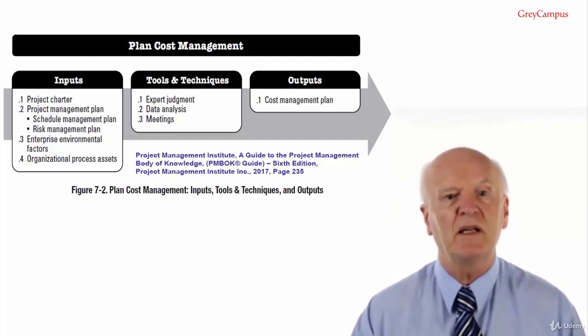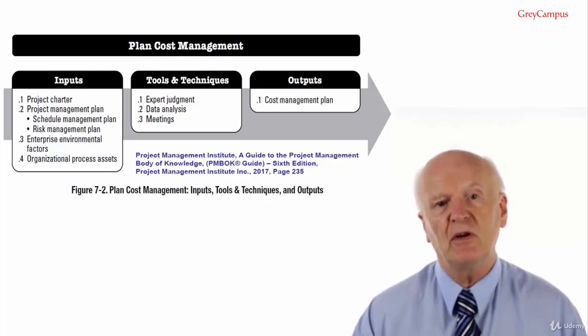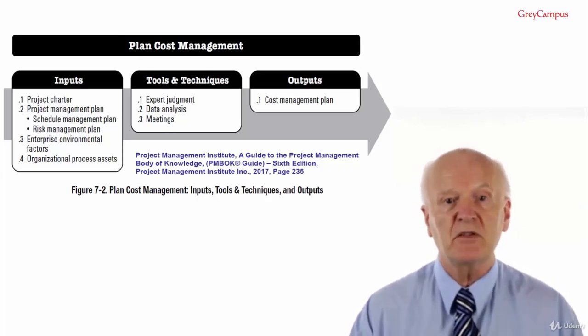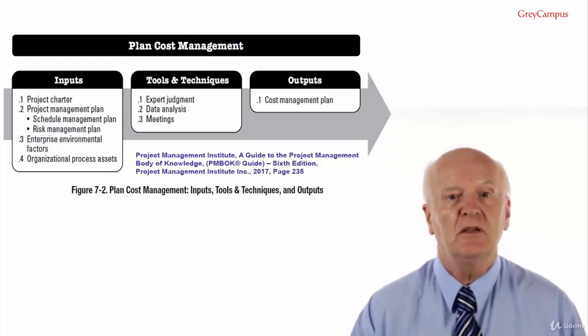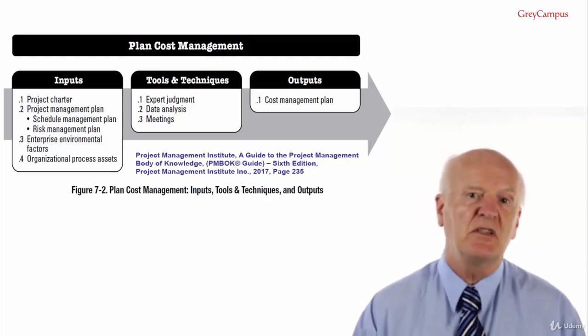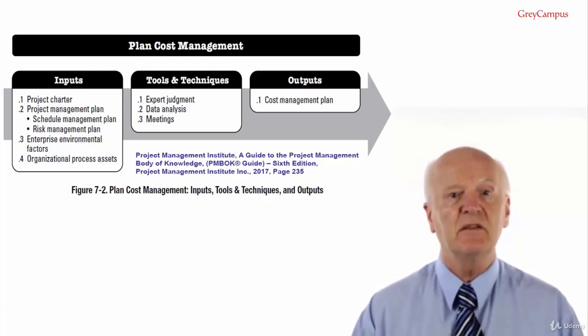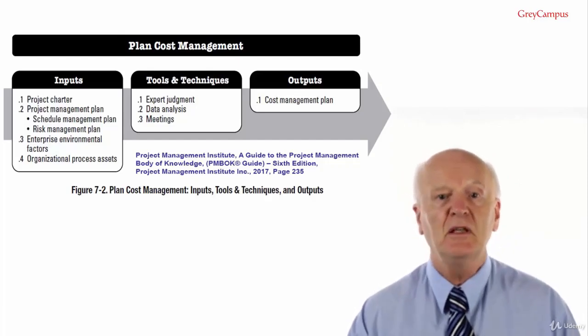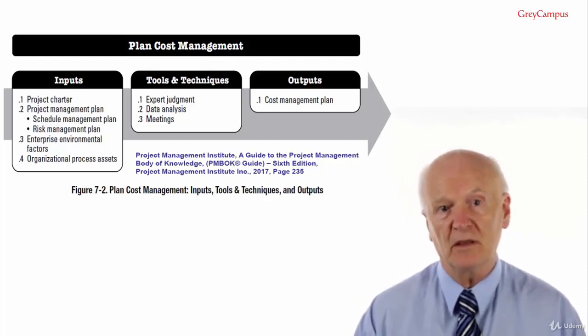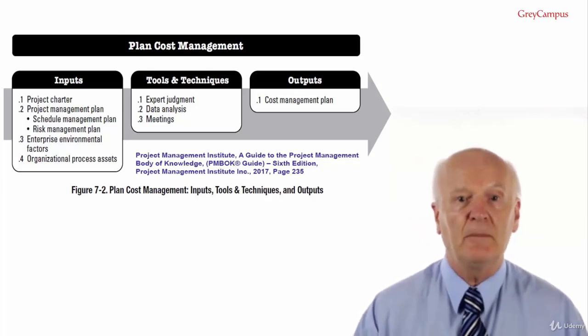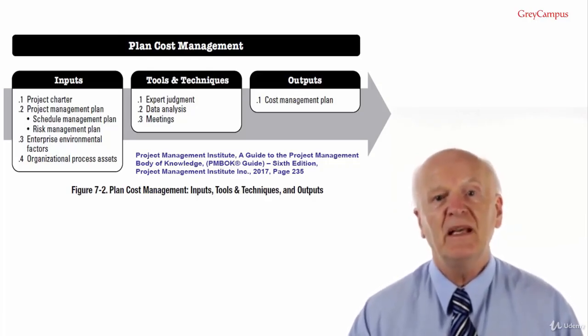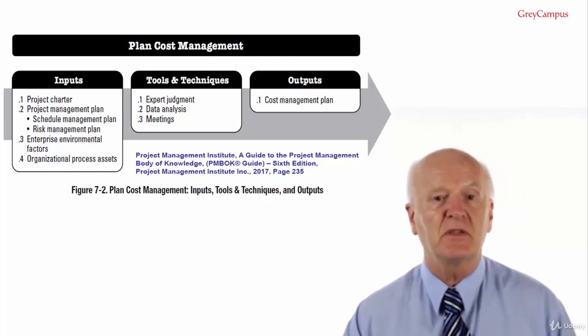For example, the cost management plan can establish the following: the units of measure, each unit used in measurements such as staff hours, staff days or weeks or time measures, meters, litres, tons, kilometres, cubic yards for quantity measurement, or lump sum and currency form is defined in each of these resources.